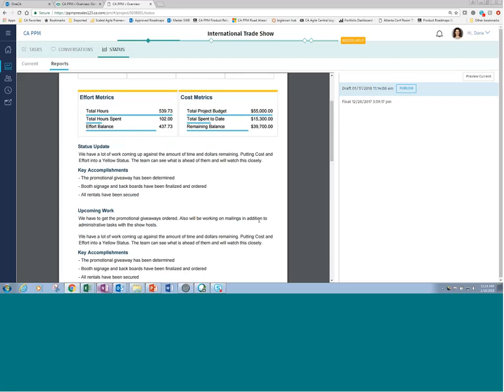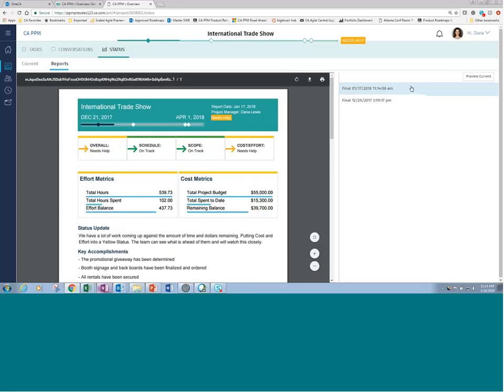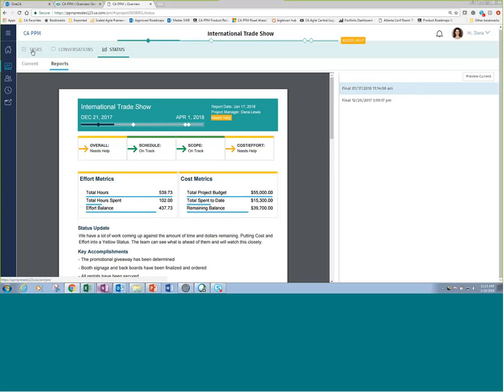If you have this connected to Microsoft Project, so if you make a change to a task, how does that affect Microsoft Project schedules? No, it's the same as it would be if we went over here and sent it out to Microsoft Project. This is just your standard way of viewing a project with phases and tasks. So nothing's changed in terms of our bidirectional integration. If we make a change here and send it out to Microsoft Project, it's updated there and vice versa. As long as you have those two systems in sync, regardless of where you update the task, whether it's the board or this list view, it'll write to Microsoft Project.